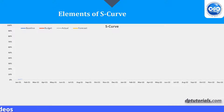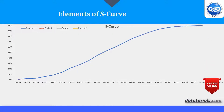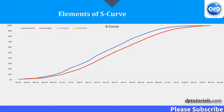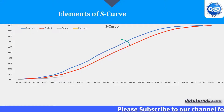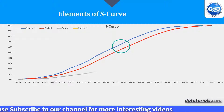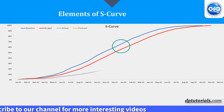As more progress is made, the growth accelerates rapidly, creating that upward slope that forms the middle part of the S. This point of maximum growth is called the point of inflection. During this period, project team members are working heavily on the project and many of the major costs are incurred.